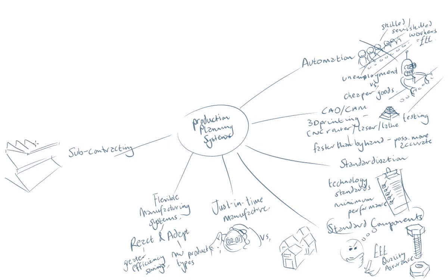So if we take an example of a football stadium, the main contract may be awarded to a construction company such as Bar Construction. They will then take that stadium plan and break it up into the separate parts, i.e. subcontracting it. They create separate contracts, which is kind of apart from the main contract. So they might have ones for the concrete, the electrics, or any steel work.